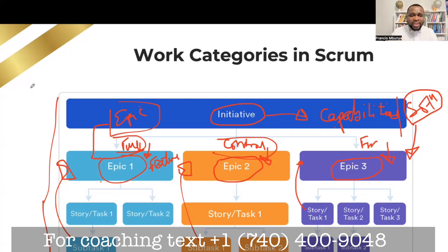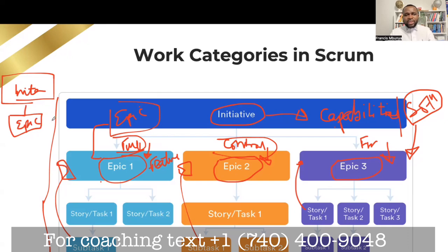When a job is labeled as an initiative, we understand that this is at the level where we're still having a high level conversation. We have not even agreed. Major business stakeholders are still having conversation. Now, when you move to the level of epic, right here is the first epic, which is a portfolio epic. All right, we have agreed and we start putting budget into what we want to do. We have the budget amount, we have an idea of what it's going to take us.